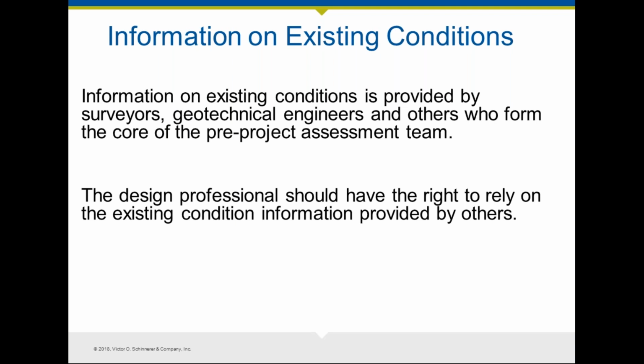The other thing that needs to happen during a planning phase is the identification of information on existing conditions. This is essential for you to be able to provide design services based on the information that's available to you. If it's not under your contract, then you probably need to rely on information provided by surveyors, by geotechnical engineers, environmental assessments, and others who form the core of the pre-project assessment team.